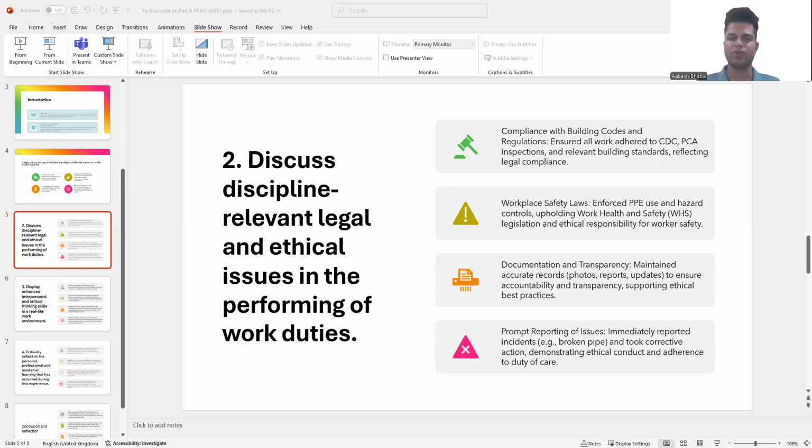The PCA engineer comes and checks whether the laid rebar is correct for the slab, and they provide us with feedback and comments. We try and rectify that as soon as we can to get our site approved for the concreting or the next step. That's what we do.